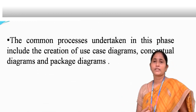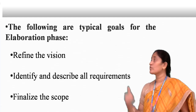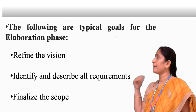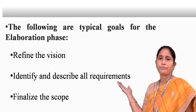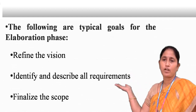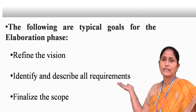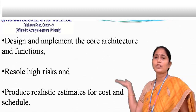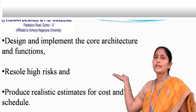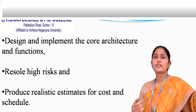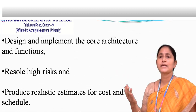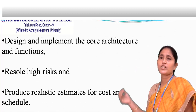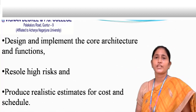The goals of the elaboration phase are: refine the vision, identify and describe all the requirements, finalize the scope, design and implement the core architecture and their functions, and resolve high risk and produce realistic estimations for cost and schedule.